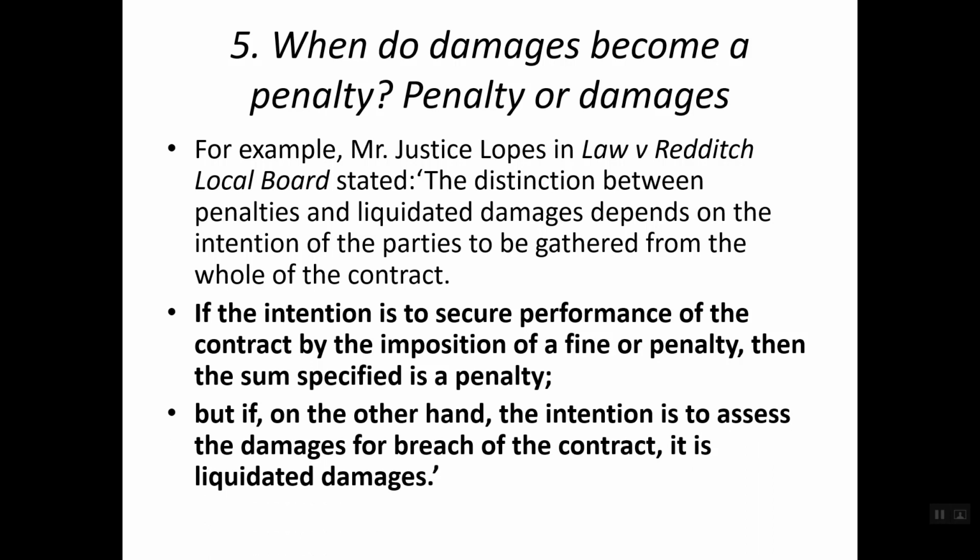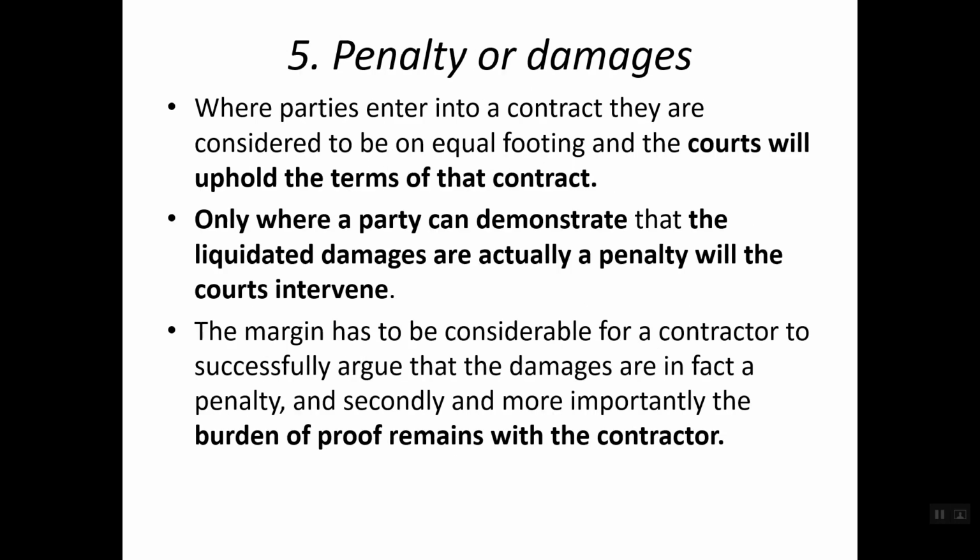The only intention should be to cover the damages. If the contractor can prove, in front of a court or a dispute resolution method, that the employer is charging a penalty, then that charge of liquidated damage should be changed. So if it seems like a penalty, the contractor can go to court, and the court can decide on the terms of that contract.